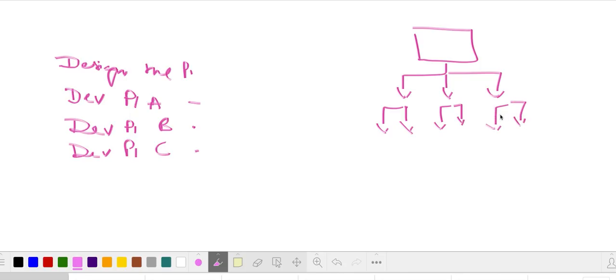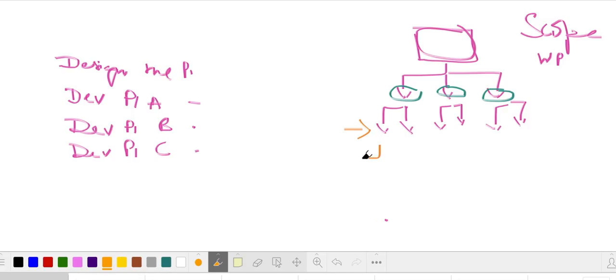In the scope chapter, the only difference was that we were decomposing the work into the work packages. These are the work packages. But further, now we are decomposing these work packages into activities. See, I'm creating so many activities out of these work packages.